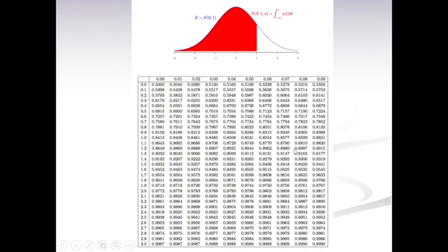So we have to take it from the normal distribution table. This is the normal distribution table. The value is minus 1.33, right? The table goes from minus 3 to 3 and this is the 0 value. Here you can see that the probability is given only from 0 to 3. For the 0 value it is 0.5. For negative values it is not given.